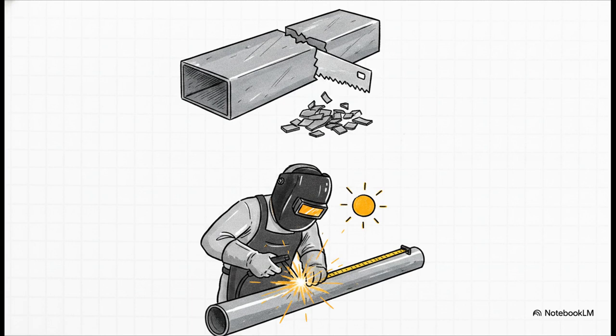Take HVAC ductwork. You can't just calculate the exact perfect volume of sheet metal you need and call it a day. You absolutely have to factor in a waste percentage for the material lost during cutting and transport.